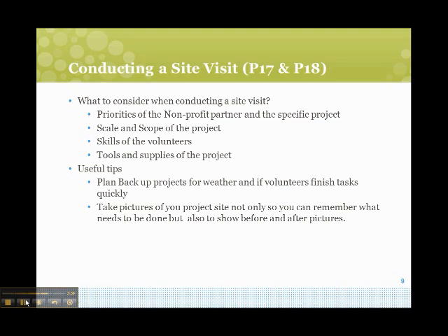After you have listed all the possible projects, you should break down each project and specify how many volunteers will be needed and how long it will take to complete it. This will help you determine how the day will go and will prepare you to separate volunteers into task groups to get started right away. Make sure to factor in backup projects. This is super important. It even has its own section on the site visit checklist.